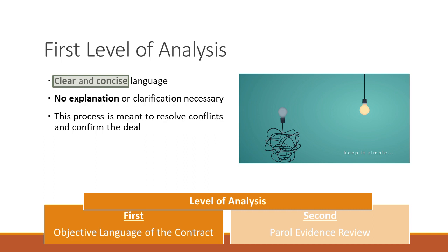You're looking at the objective language, which includes, for your profession, the actual drawings and specifications. And so sometimes you may respond to the RFI and say, see page A15, detail 2, and it'll have a section of how that wall detail is supposed to be built, and that's your answer. The RFI says, look to this clear language as to how this wall detail is to be built. Or, you may have to provide more information because, again, your drawings aren't 100% perfect. But that's this enforcement of the language as written.